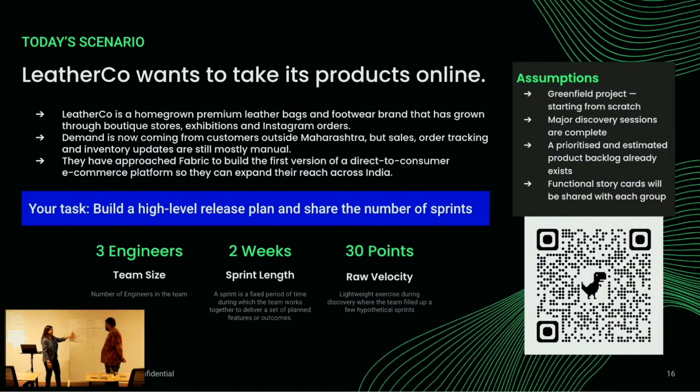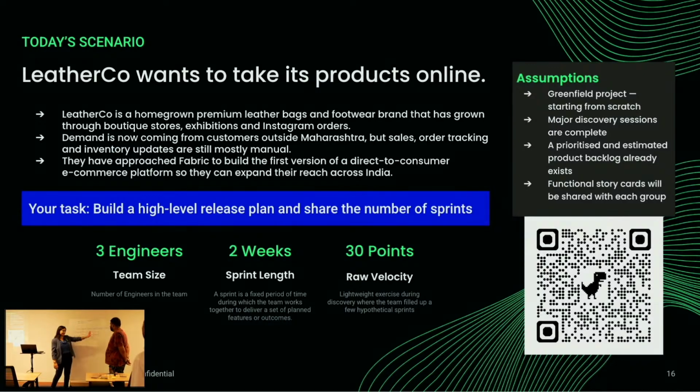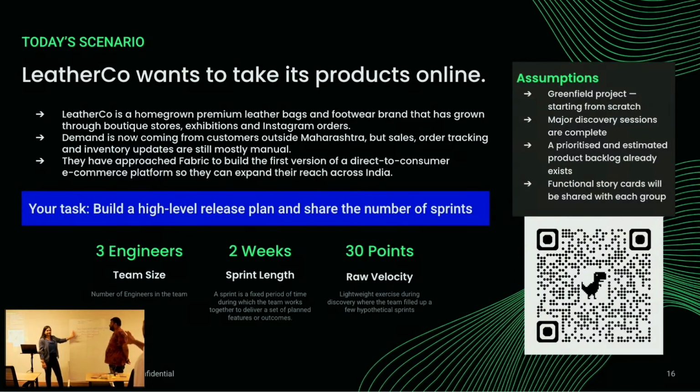So you folks think that you can complete this project in 4 sprints? At least the MVP will be ready, but depending upon the defects, the resolution, or any of the edge cases, then at the time of testing, sprint 5 will be required just to make sure that end-to-end flow and integration is done with the system.